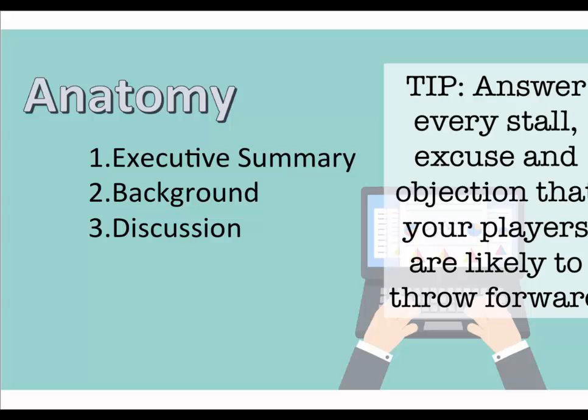So when you're talking about objective and scope, you need to talk about what you're delivering using the SMART guidelines: specific, measurable, realistic and time framed. If you just say we're going to deliver patient education, it doesn't detail exactly, very specifically or in a time framed, measurable manner what that means. So in here you need to deliver the design of your solution in very specific forms. You're going to deliver 4 programs of antenatal and postnatal programs that are going to be ready to deliver in 6 months, and we will deliver them to this particular group of our patient mix in this setting. And that is a very specific way of detailing what your objective is and the scope of that project.